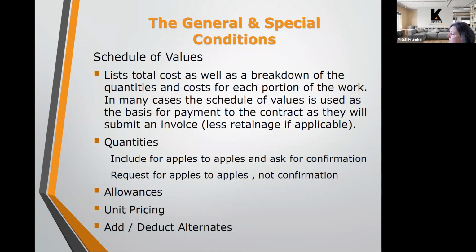So the unit pricing is meant to capture those items that are most often encountered during a specific type of project. In the case of roofing, when they remove those roof shingles and the sheathing is exposed, there may be areas of sheathing that are soft or water damaged, or have other problems where it needs to be replaced.